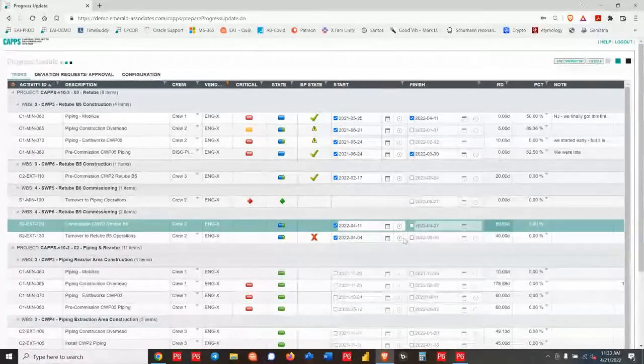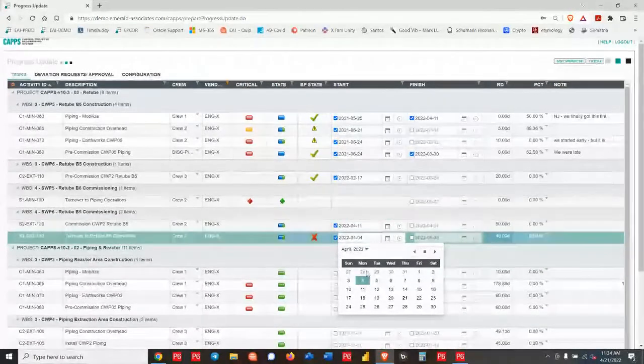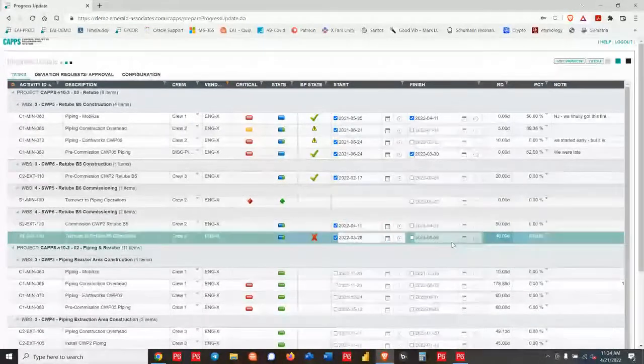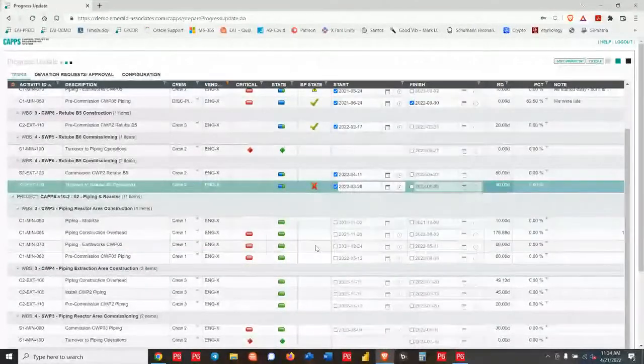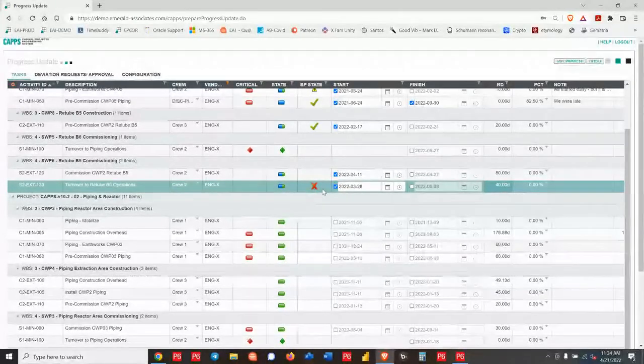I could, certainly this one was rejected, and it's conceivable that I had done something wrong. The note would explain it, and I can fix that up. And because I've made an edit to it, it's going to get resubmitted. Okay, so that's going to go into P6 with a resubmit on it. So it's going to go in with another visual that I didn't have in here was a little eye, blue eye for information, letting you know that it's been resubmitted, but it hasn't been reviewed yet.